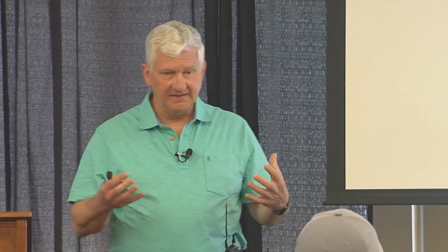Do we have the right project? What are we missing? What has changed in the world? Has any legislation changed? Have any settlement agreements occurred that we need to be aware of? What has changed in the world since this project was scoped? That is an invaluable tool. Again, we'll be reaching out to the technical resources in this room to make sure we have the right project, that the world hasn't changed significantly, and what we need to start working on now.